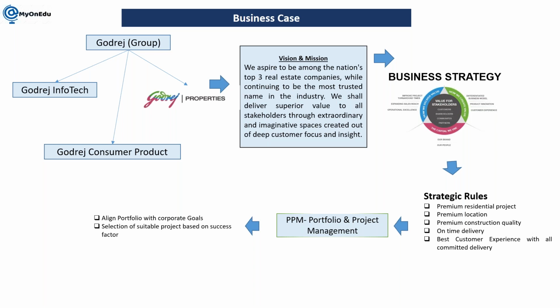If it is fitting, if your success factor is positive, if your NPV and internal rate of return are as per your market strategies, and you may achieve the goals, then you will start this project. Based on this, you will select a suitable project, otherwise you will stop the project right here.